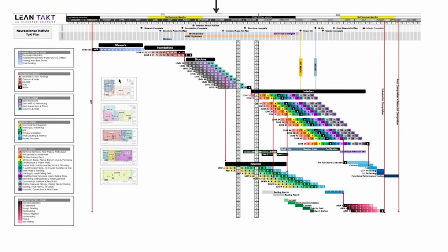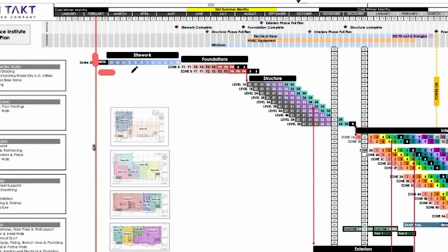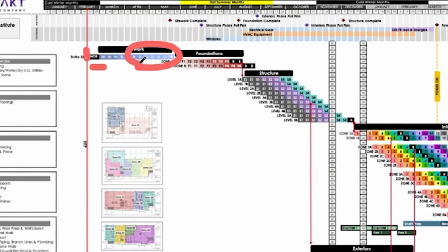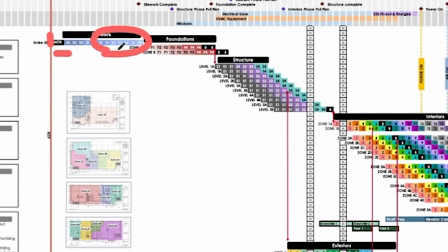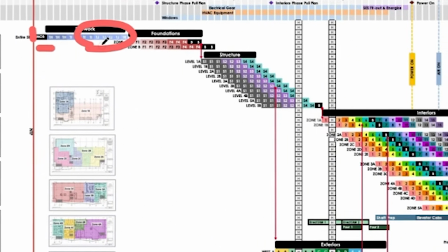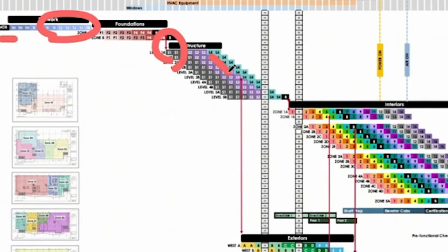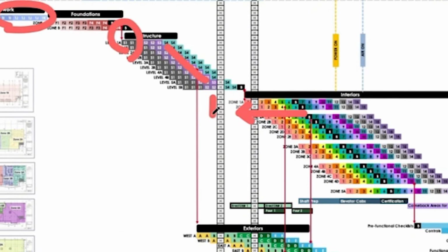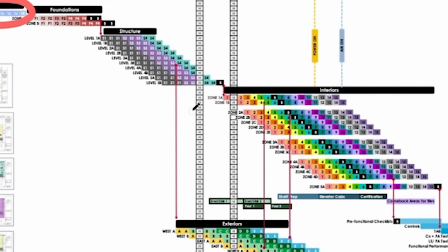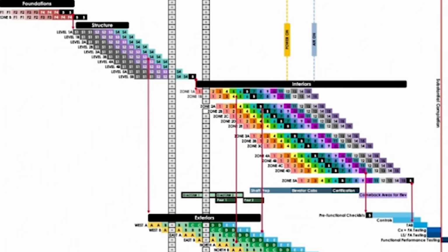And oh my gosh, let me go ahead and do this real quick. What I like to do, and we'll cover this just a little bit later, is be like, okay, how are we going to start? How long does that take? Hey, is there any way that we could speed this up by designing to the work package, or by speeding up the activity without rushing and pushing and panicking labor, right? Is this transition correct over here? Is this at the right line of balance? Can we move this phase forward and start sooner based on the structure? Like, you can come through and start like literally tearing this apart from a strategic standpoint and really make some